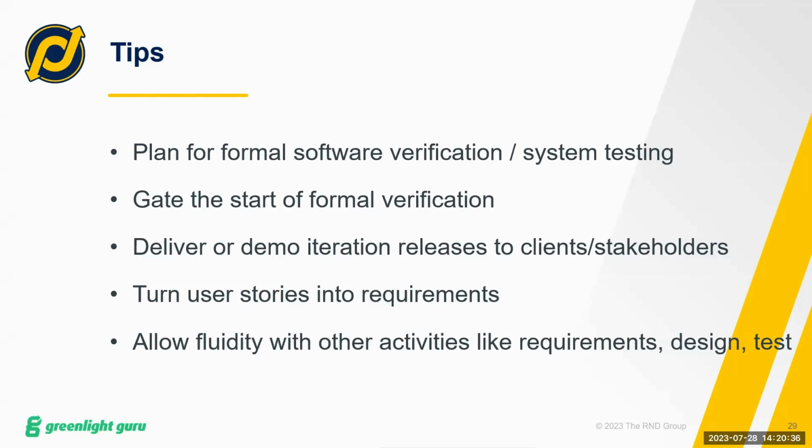You also want to make sure that you turn your user stories into requirements. Because we're doing medical devices, we need actual requirements like the software shall do this, the software shall do that, right? We need those. So take those user story narratives and turn them into requirements that can be incorporated into your requirements documents. And then the final tip is to make sure you allow fluidity with your other activities.